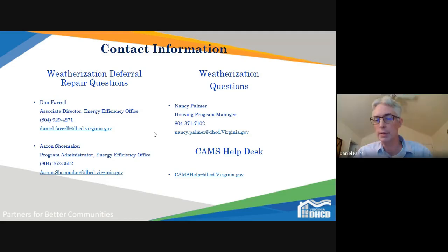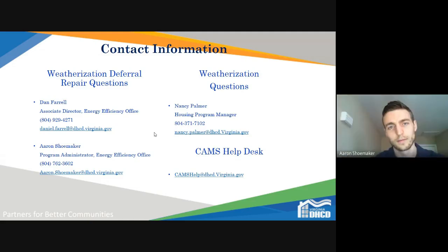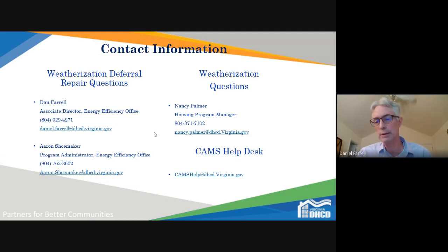All right, very good. So there's a question from Brooke about remittances only available after project job approval. So yes, we'll want to get the project set up and approved based on the estimates provided for the repairs. And then once the work is complete, then the remittance can be submitted, but you can't put the cart before the horse. So hopefully that's fair on that.